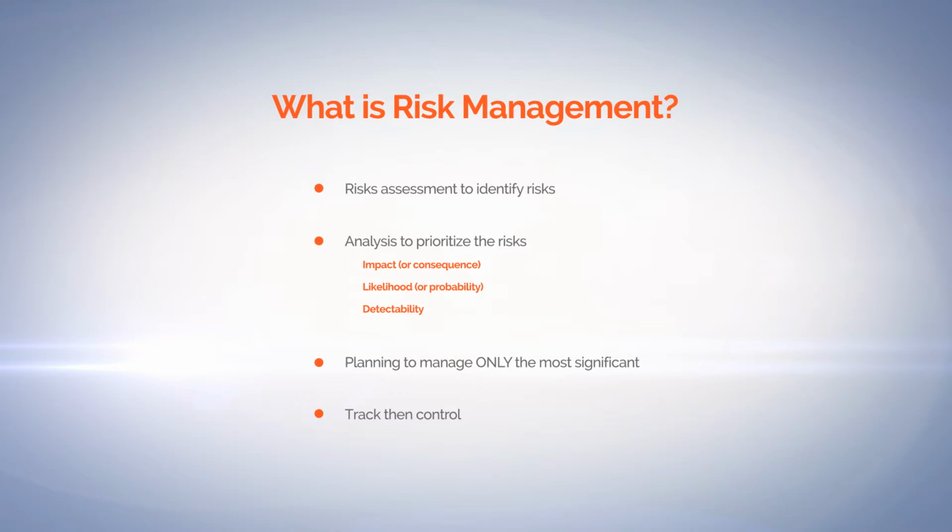But then when you plan, you only manage the most significant risks. I have on numerous occasions had colleagues who come to me and said, oh, Janie, I know you're into risks. Can I show you my risk management plan? Yes, of course you can. And they've actually determined what they're going to do about every single risk, even if it was minimal impact and highly unlikely to occur, which is really, unfortunately, a total waste of time and effort. You will only plan to manage the most significant risks.